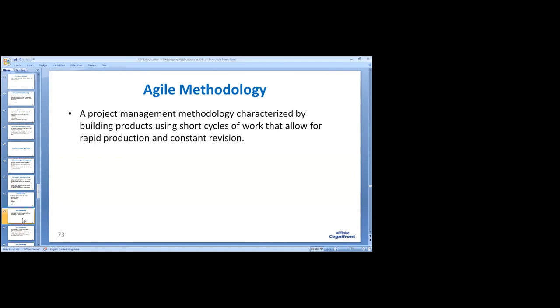In this methodology, we do not have a plan of 2 or 3 years. We prepare a plan of, let us say, 1 week, 2 weeks, or 1 month, not more than 1 month. And in every plan, we try to finish the whole cycle of project development. That is, after, let us say, 1 week, we iterate again and start developing, recycling the development as a second iteration, and then a third iteration, till the project is completed. So: understanding requirements, working on them, ultimately finishing, reviewing, and then beginning once again. We carry out a small amount of work at a time and keep adding new work to the existing work, and thereby we complete the whole project after some iterative cycles.